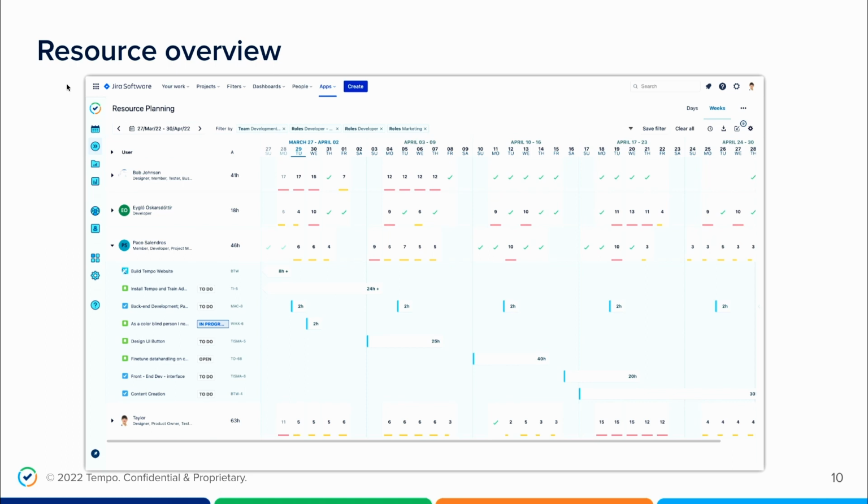On the resource planning page, a project manager can determine who in the team has availability to work on a future project and plan time on the project by reserving that resource. Using the date field at the top left, they can select the period of time in the future for this upcoming project and plan the resource. After creating the plans on a project level, the project manager can go back to the plan time report and see how much time has been planned to be invested in this new customer project.